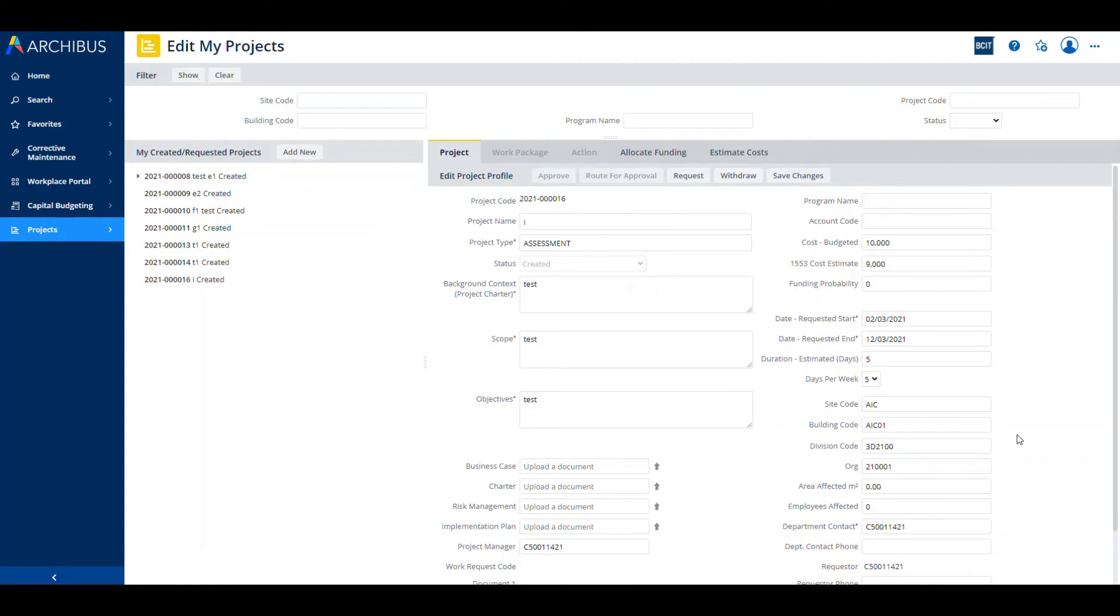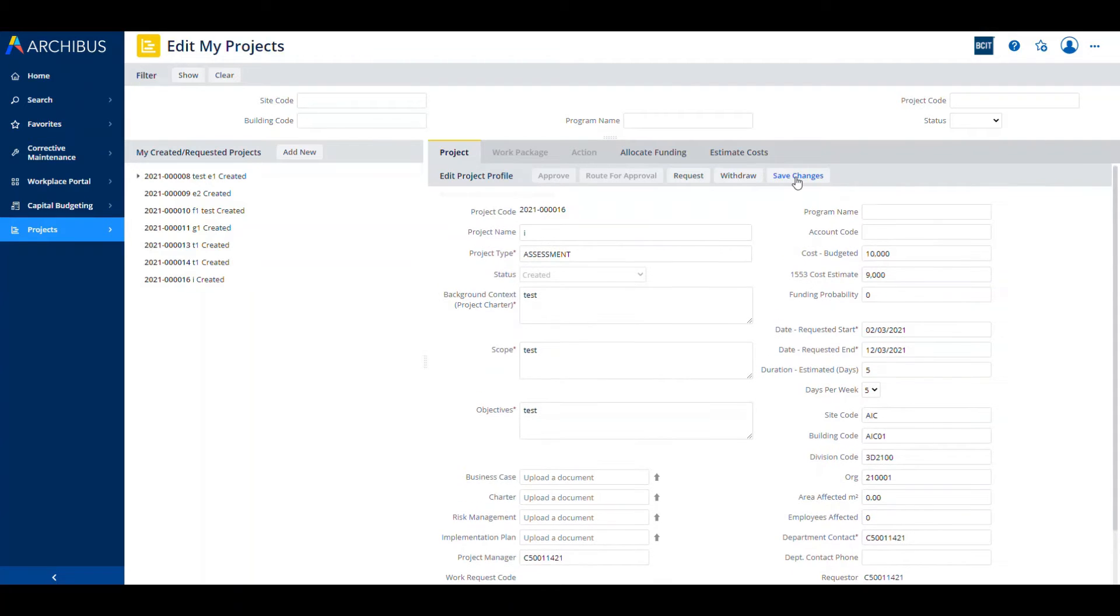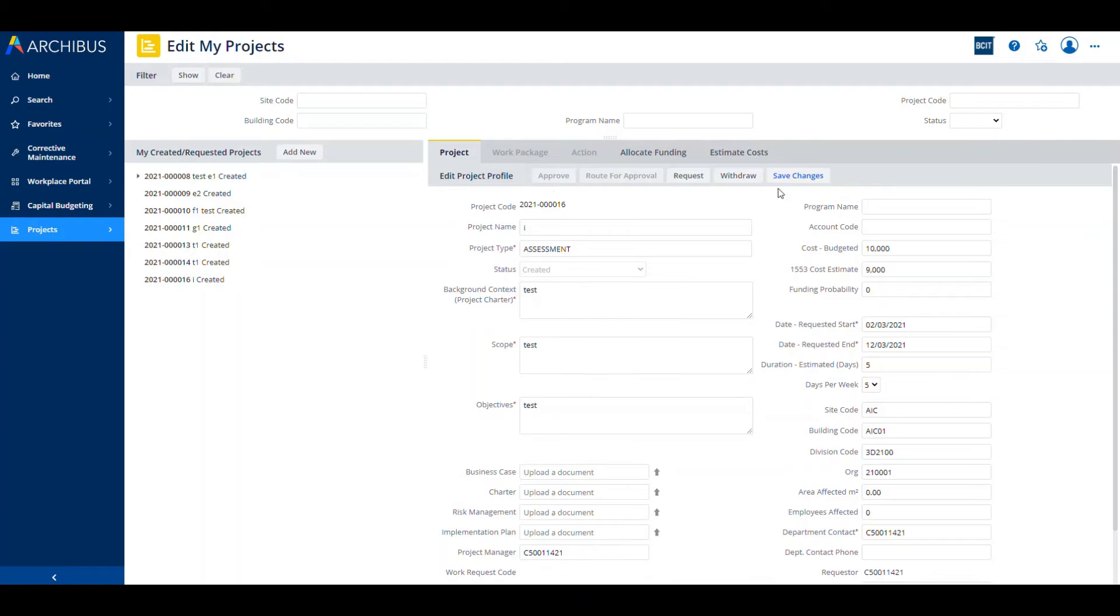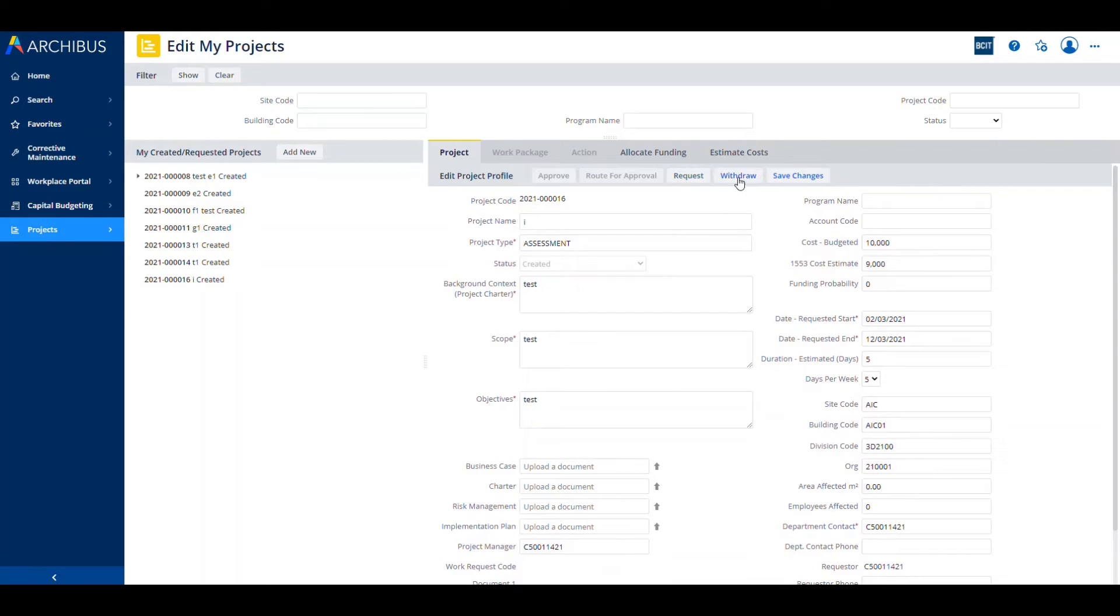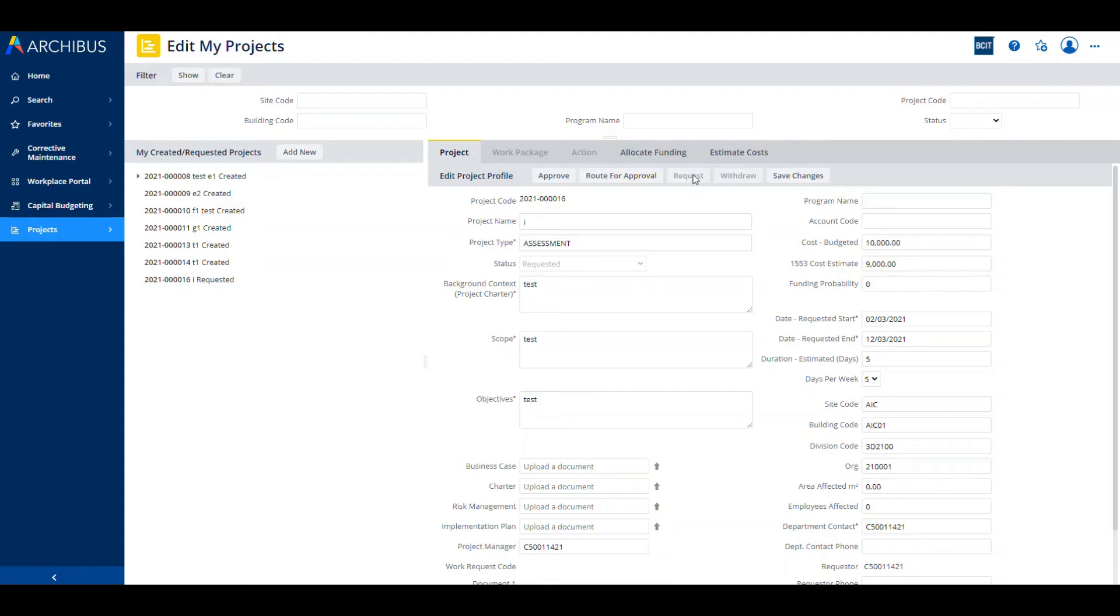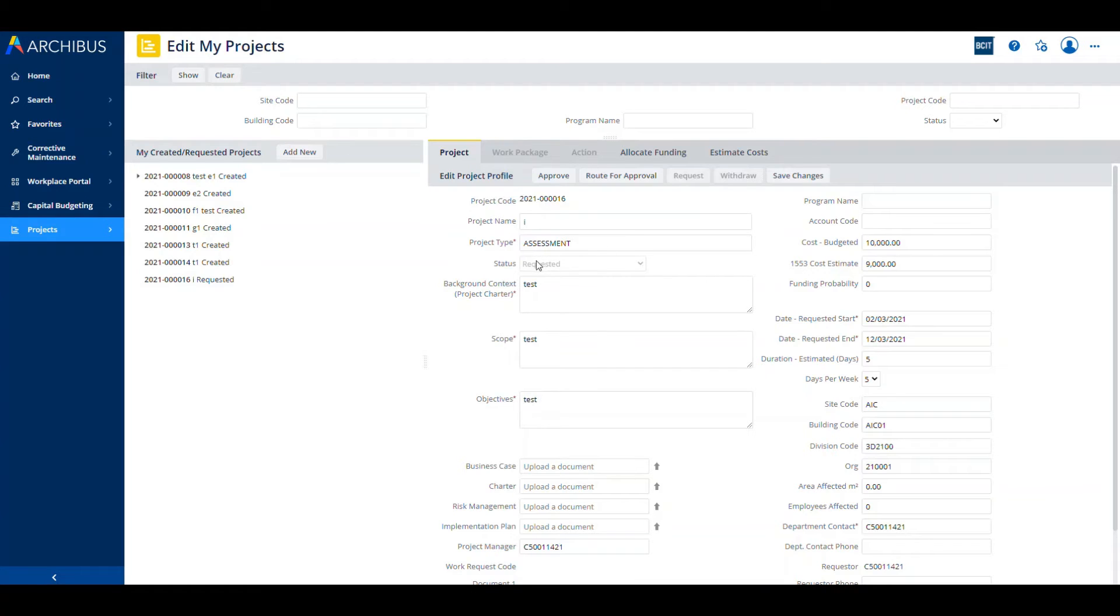We've entered all of our mandatory fields and we're ready to move on. Good idea, like in any program, to get used to saving your progress as you go along. That's done through the save changes here. You're going to notice next to the save changes, there's a request and a withdraw. Right now, before we hit request, we're in kind of a draft format for the project. When you're ready to stage it for the next step prior to approval, you're going to hit request. Important to note that once you've requested something, it has changed status. You won't be able to withdraw it from that point. You're going to notice that the status button down here has changed to requested, which is exactly what we want.